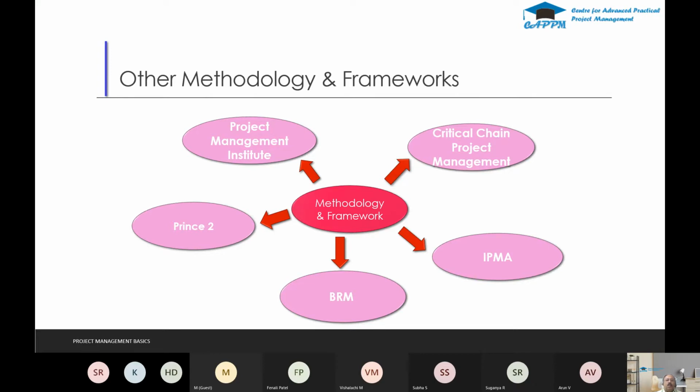And then we have the IPMA, International Project Management Association. They develop the standards based on the countries, and the benefits relationship management, which follows 5 different process groups: aligning, consulting, enabling, servicing, and evolving. And PRINCE2 is mostly followed in European countries and the UK. It's for projects in a controlled environment, wherein it deals with 7 principles, 7 themes, and 7 processes, which is mostly outcome based and not output based.